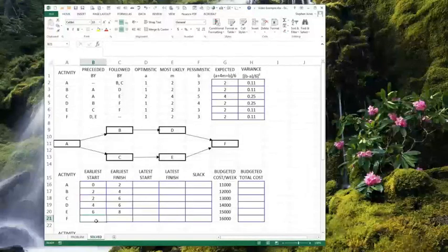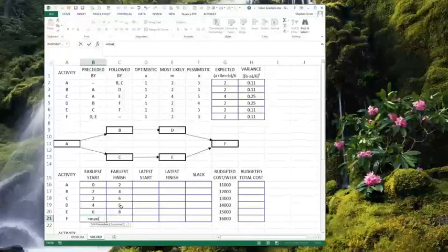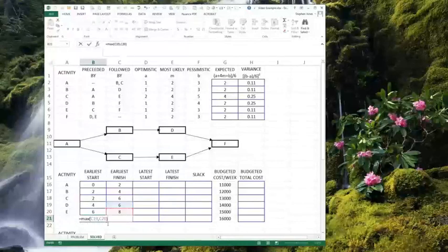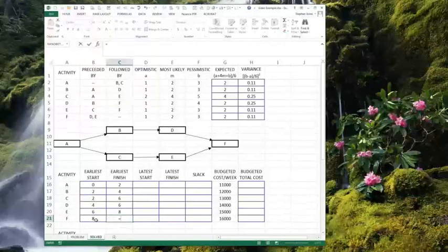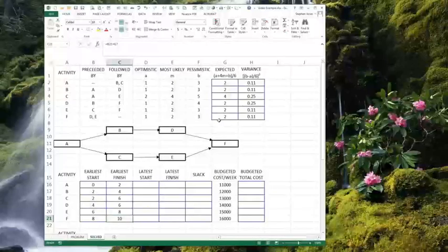So instead, I do max, and then I have it look at the max between those two, and it gives me the 8, which I knew it would do. So the earliest finish is this one right here, plus how long its duration is, and it goes to 10. So we know that 10 is the earliest that we're going to finish here, or is the maximum amount of time that it's going to take. That means 10 weeks for the entire process.